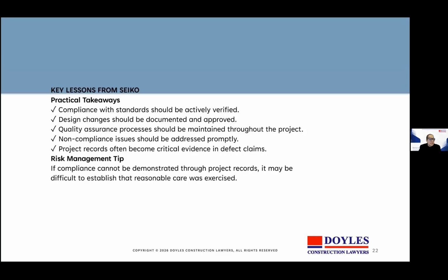As a risk management tip, if compliance can't be demonstrated through the project records, it may be difficult to establish that reasonable care was exercised. So practically, verify your compliance documents and approve design changes. Keep your QA running. Fix non-compliance quickly. And if it's not in your records, you can't show that you took reasonable care.